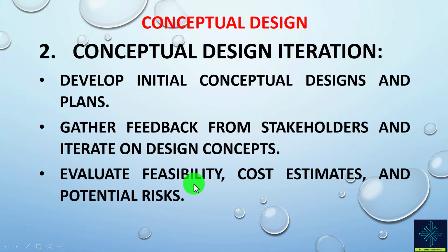We also evaluate the feasibility, cost estimates, and potential risks. Again, this is a high-level estimation, based on the feasibility study that we have done in the initial phase. We just do the evaluation and revise the cost estimates, and we again go into the details of the potential risks that we can develop from the feasibility and from the cost estimates and other aspects of the project.